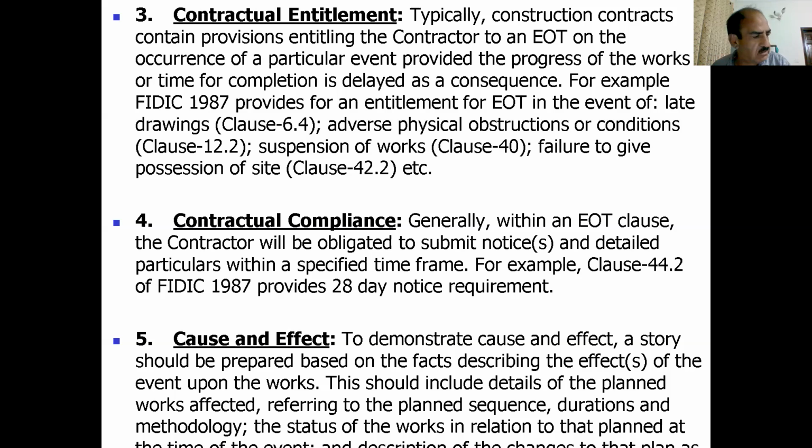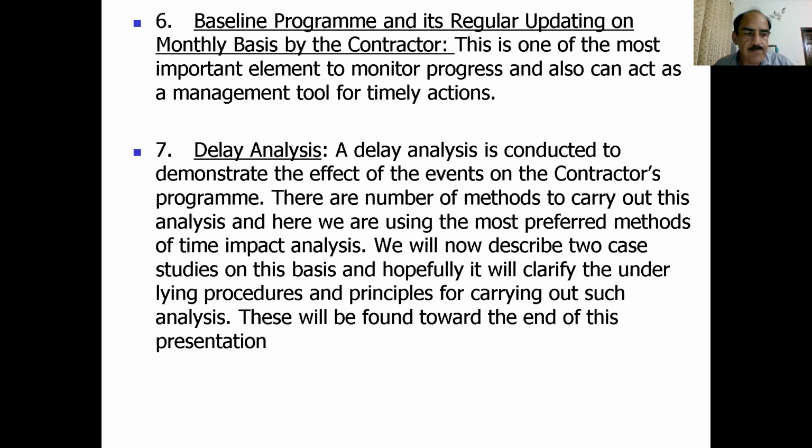The next is the baseline program and the regular updating on a monthly basis by the contractor. This is one of the most important elements to monitor the progress. Unfortunately, in most of the projects I have seen that the master programming or baseline programming is not well developed. As a matter of fact, this programming is the base for your monitoring and evaluation of the project.